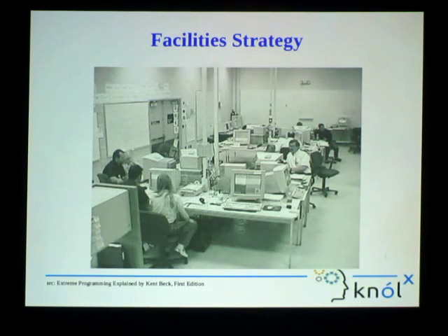This is how they keep track of the progress. As soon as we move a task from in progress to done or complete or close, it says okay, it's done, but now the line goes a little bit further up, as if no work has been done till now. But as soon as we complete another task, it goes down. But the ideal curve should be like this. Yeah, it goes down only when the story is accepted, right?